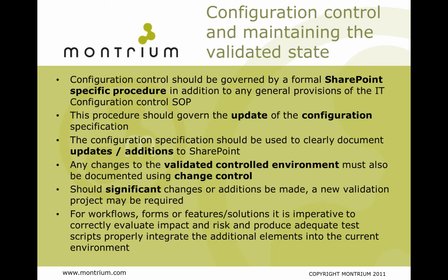And then typically when you're deploying new workflows or updating workflows, forms, features or solutions, it's very, very important to perform impact assessment and that you re-execute or create new test scripts if there's any impact on your existing environment. You will of course also need to validate those items to maintain the overall validated state of the system.